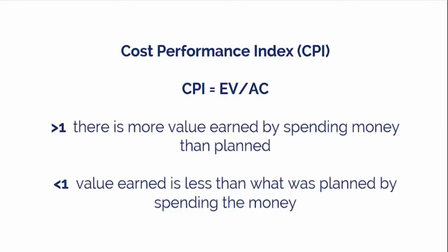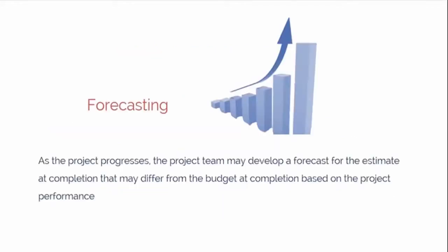Collectively, these values can be a great reporting and analysis tool to understand the pulse of the project, if it is within schedule as planned and within budget as planned. Note that a good rule of thumb to remember is that any calculation that results in a negative number or less than 1 is bad news.